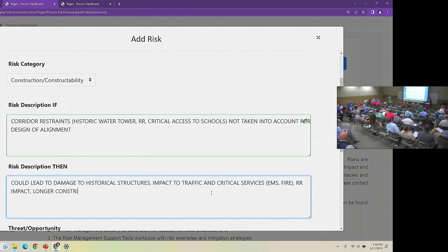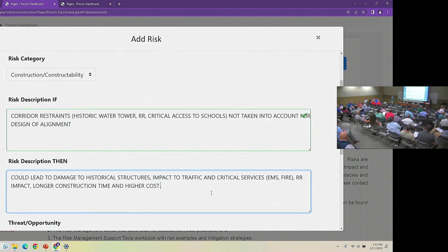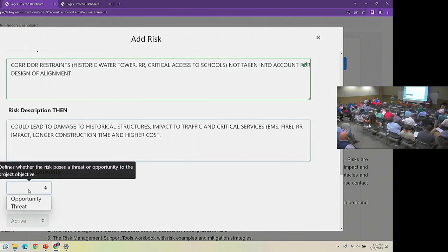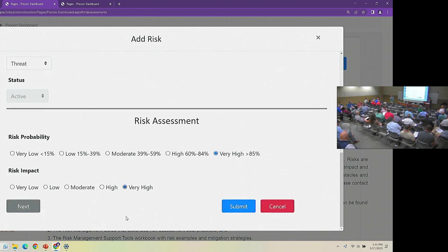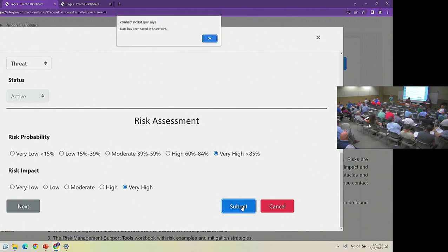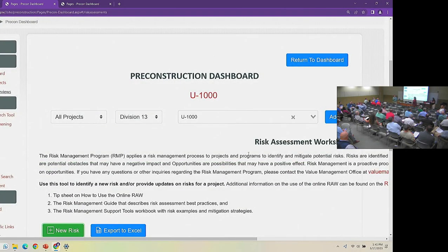Yes, right? So this is a brand new project and you got briefed by someone that does not know the project very well, right? So if you had the project manager in your group, you got a little bit of a bump there, but this is a preliminary project. It just started. And so this is what's going to happen in real life as you try to identify your risks. If you don't have a lot of information, you're going to have a lot of risks, right? And your risks are going to be very general because you just don't know enough. As you get more information, you're able to pare down your risks. You're able to change and look at the different strategies and refine them as you go, right?